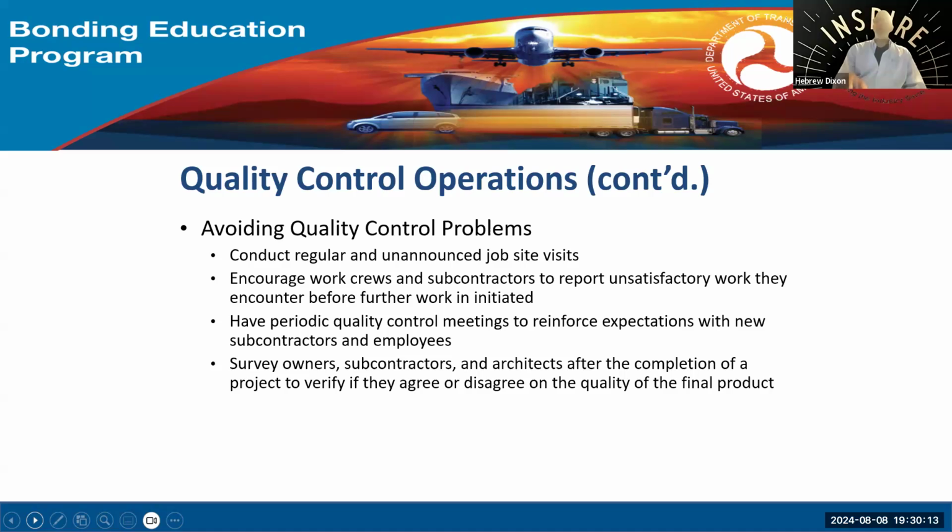Now, don't you all know that you can reduce your retainage at 50% of the project? Everybody usually knows that, right? Everybody usually knows I've got 10% retainage on a project and at 50% I can get it reduced. Let me tell you, out of 10 people that know that, 7 people don't do it. So don't be in that 7. Either they forget about it, or they've got a lot of money flowing and don't worry about it. But they won't say, oh, Brandy, you need to do your paperwork. Kennedy, you didn't do your paperwork for reduced retainage. Willie, you didn't send your paperwork for reduced retainage in. Why don't you go ahead and do that?